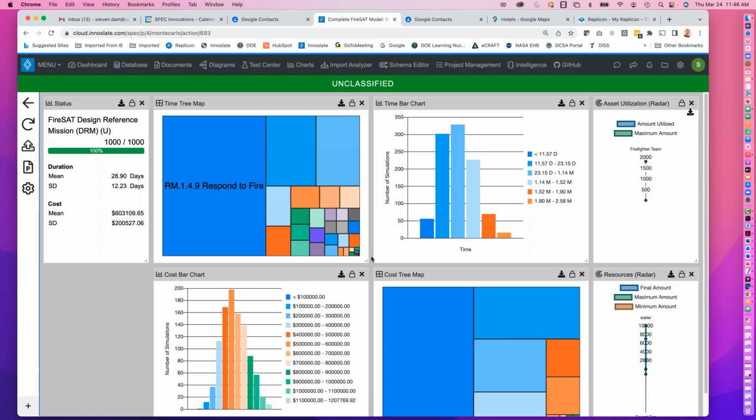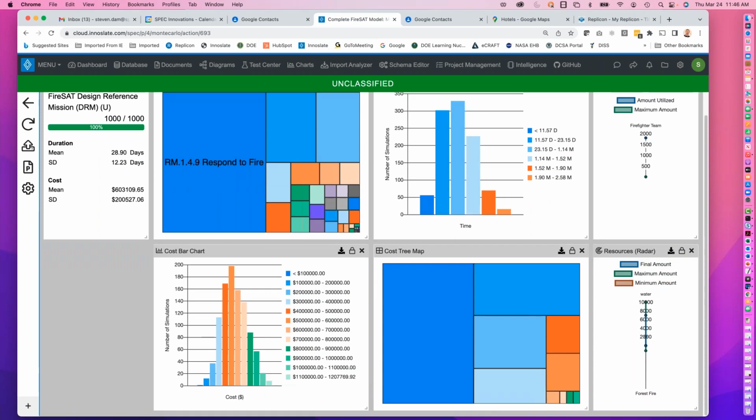And that's not unreasonable for, again, California's fire season. Unfortunately, some of the big fires take a long time to put out. And this again goes as low as $100,000 and up to 1.2 million. So again, you can see those distributions. If you're trying to understand your risk, and you think I'm going to budget for my fire season and I'm going to budget $800,000, well, I run the risk that I'm going to run into fires that are going to be over that cost, per fire. And so again, hopefully I run into enough of these that it's not a problem, and I budgeted sufficiently for that season.